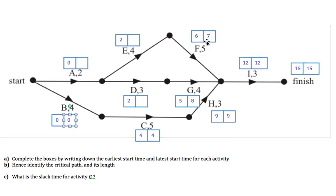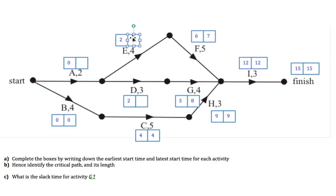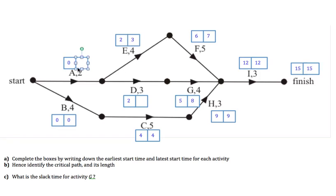Going along the top path, we have the latest start time for F, so we go back to E. E needs to finish so that F can start no later than 7. E takes 4 to complete, so the latest possible time for E to start would be 3, because 3 plus 4 still allows F to start at 7. Now for Activity A, we need to work out the latest start times for both D and E before we can determine A's value.